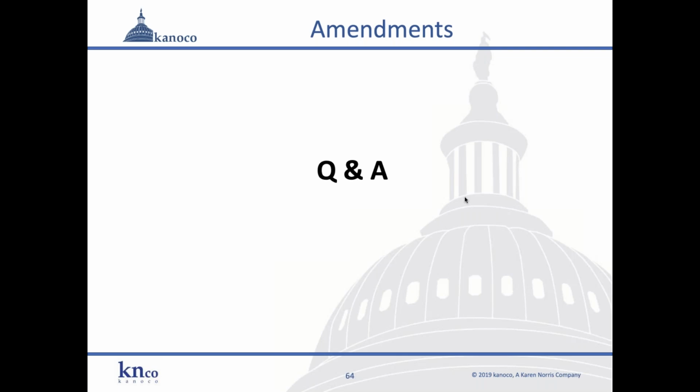Great. And one final question I have is, what is a typical turnaround time? How long can we expect to hear back from the awarding agency in response to an amendment request? The uniform guidance gives awarding agencies 30 days to respond to a written amendment request. So that part is good, and that part is helpful. But that's the response to the amendment request.